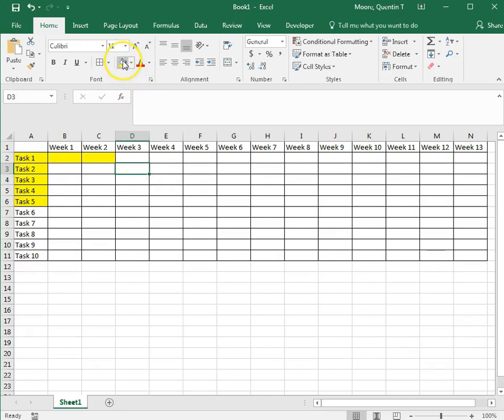1 to be completed before it's initiated. We'll say that task 3 can start after task 1, but at the same time as task 2. We'll say that task 4 is dependent. In this case, it's going to take that time. And then perhaps we'll say that task 5, just as a realistic example, actually won't get started until week 9, and it'll conclude at the end of week 11.